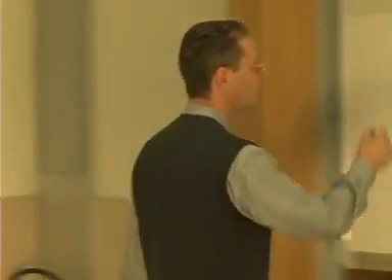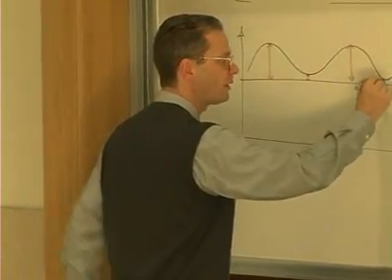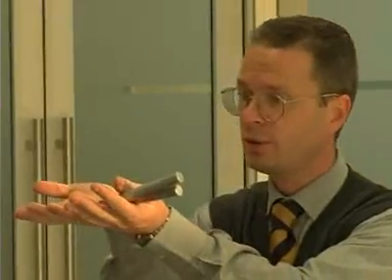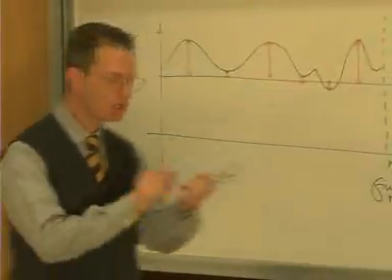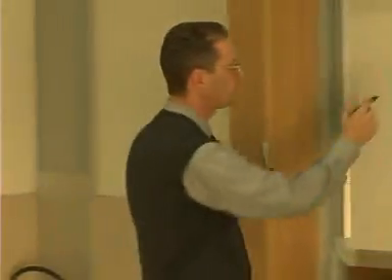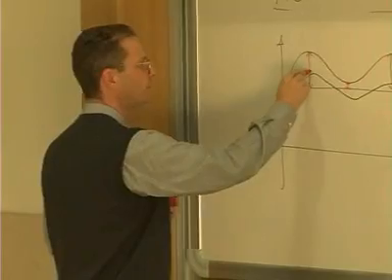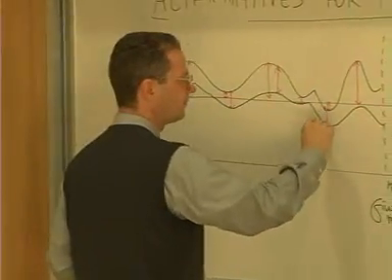But there are some other years where this situation is not met. This one, and particularly this one, where it would be much more advisable to reduce the amount of loan repaid in order to keep the inequality of cash available over cash needed with a positive sign. I don't know if you got it. The idea should be that the debt service should be adapted in a sort of this kind of behavior. This is a much better solution, because a solution like this one allows me to keep a minimum difference every year between the cash available and cash needed.